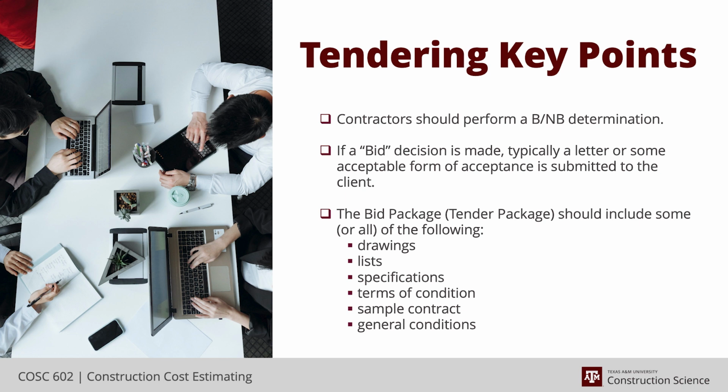Usually at the end of FEL 3, it's got to go through the gate to get to FEL 4 before it's really going to happen. But then you have instrument lists, pipeline lists, HSE lists, and other specialty item lists for piping. So the lists become quite extensive in FEL 3 compared to FEL 2.